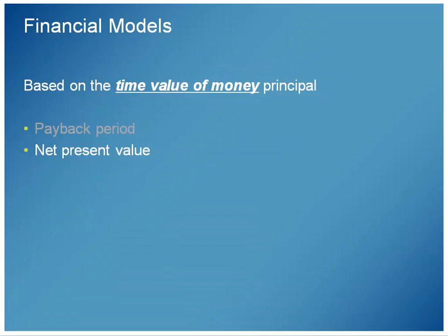Okay, another financial term, financial model we want to be aware of, based on the fact that future dollars are different than today's dollars, is the idea of net present value. Net present value calculates the change in the firm's value if the project is undertaken, the benefit. Now, a positive net present value means the firm is worth more money. It's a good thing if you invest. Not all investments are good things, but a positive net present value is a good thing.